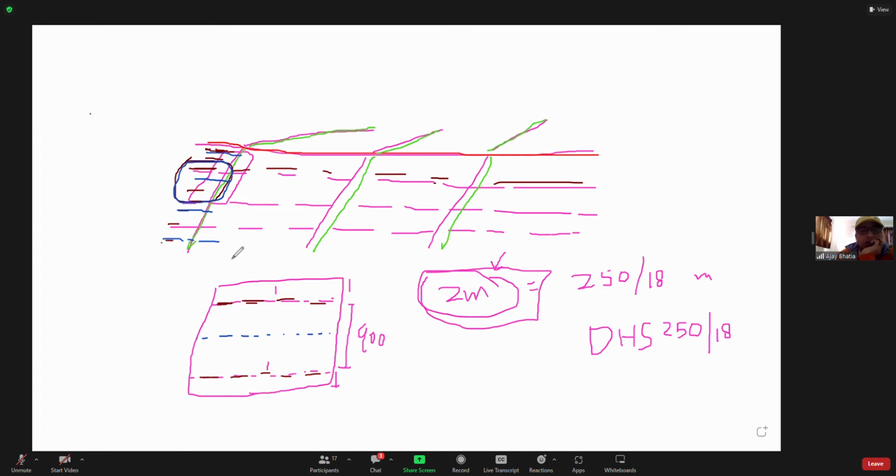Right? Yeah. So that is the situation basically when you calculate for your purlin. So how do you calculate in 1 square meter? You either have 1 length of purlin or maybe less than 1 length, because it's 1.8. So you divide 1 by 1.8. How many lengths of purlin would you have?